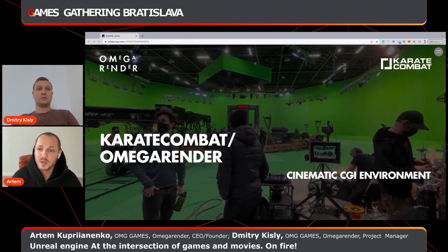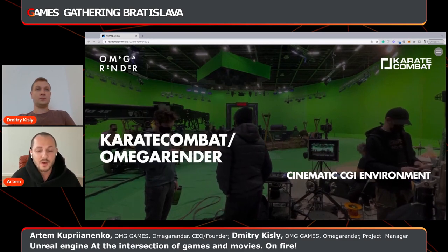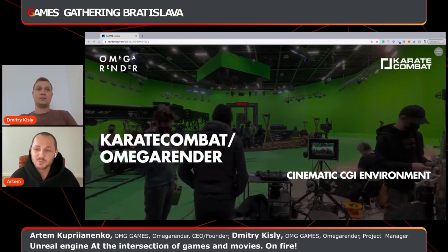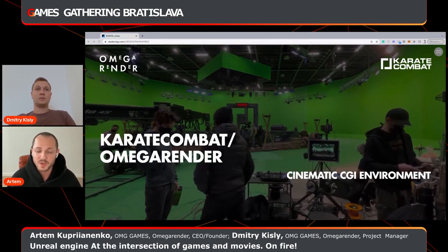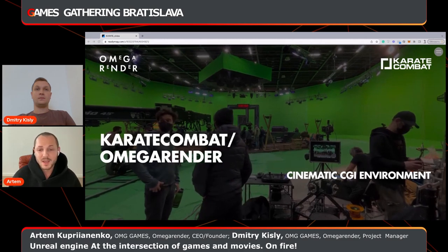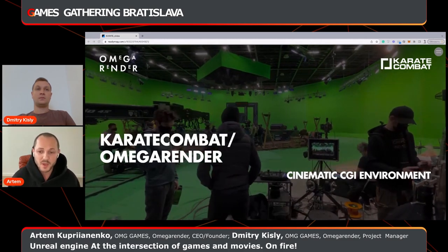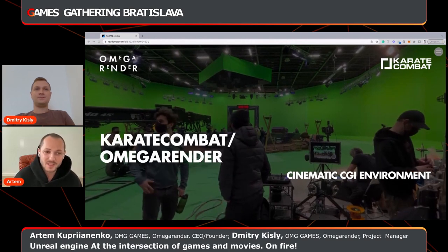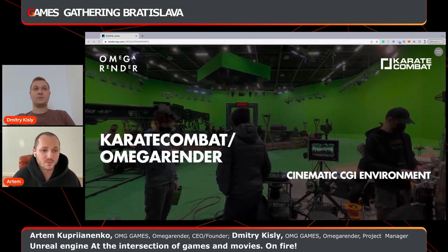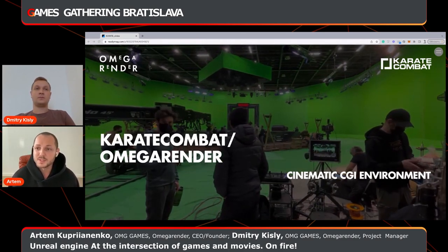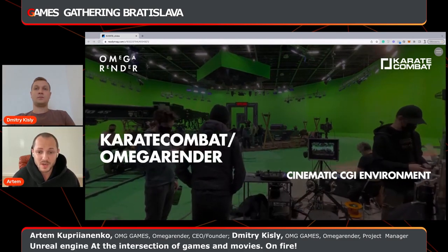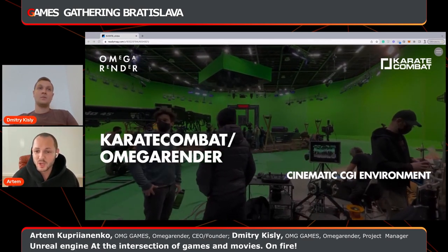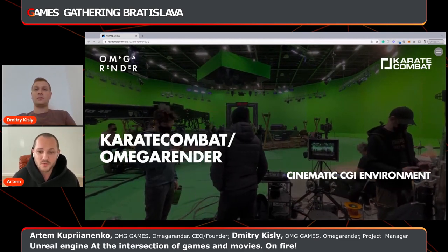First of all, the timing of the final video was almost 460 minutes, and we had to deliver this within 6 months. And when I say 6 months, it does not mean that we spent all 6 months just on compositing and color correction. In these 6 months, we had to make the concepts, modeling, all optimization, renderings, compositing, color correction, and work with the tracking data. When you put all these parts of the project together, you can understand that for compositing you have just 1.5 months. One month you have for the concept, and you also have to spend a lot of time on optimization, renderings, etc.